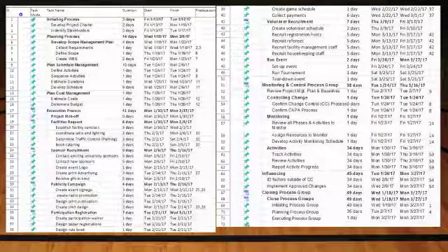In order to organize our project phases, deliverables, and dependencies, we used Microsoft Project. This project management software allows us to connect the deliverables and tasks by time and duration, and gives us a visual overview of the project plan. The predecessors line also allows us to connect dependencies or tasks in chronological order.